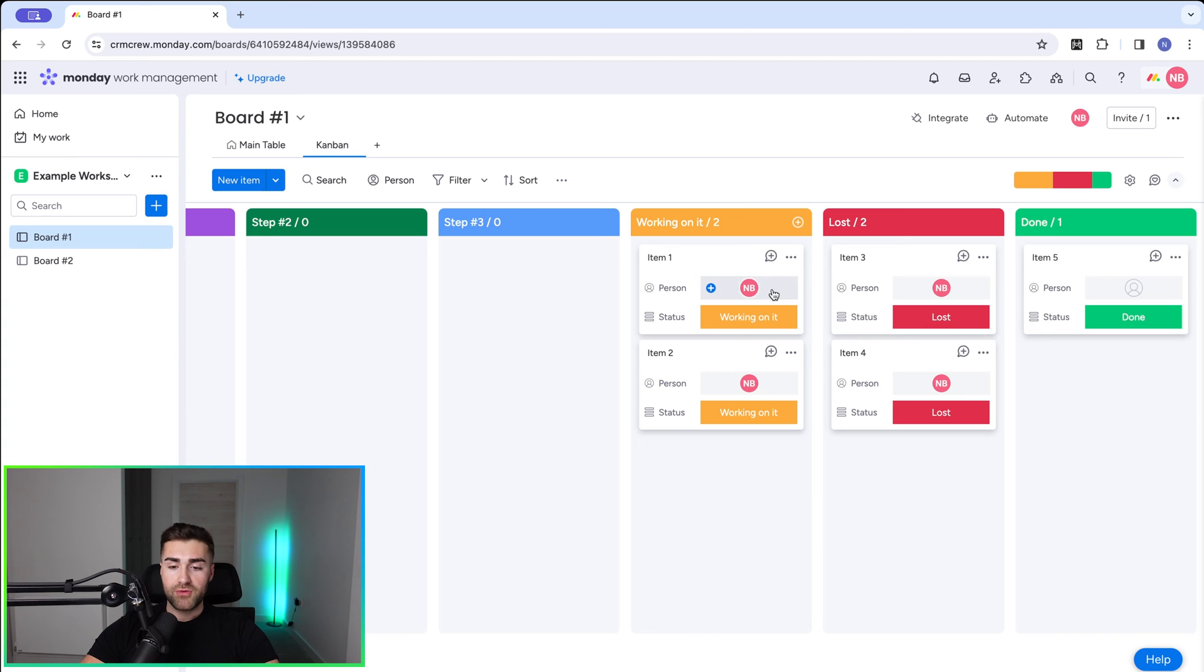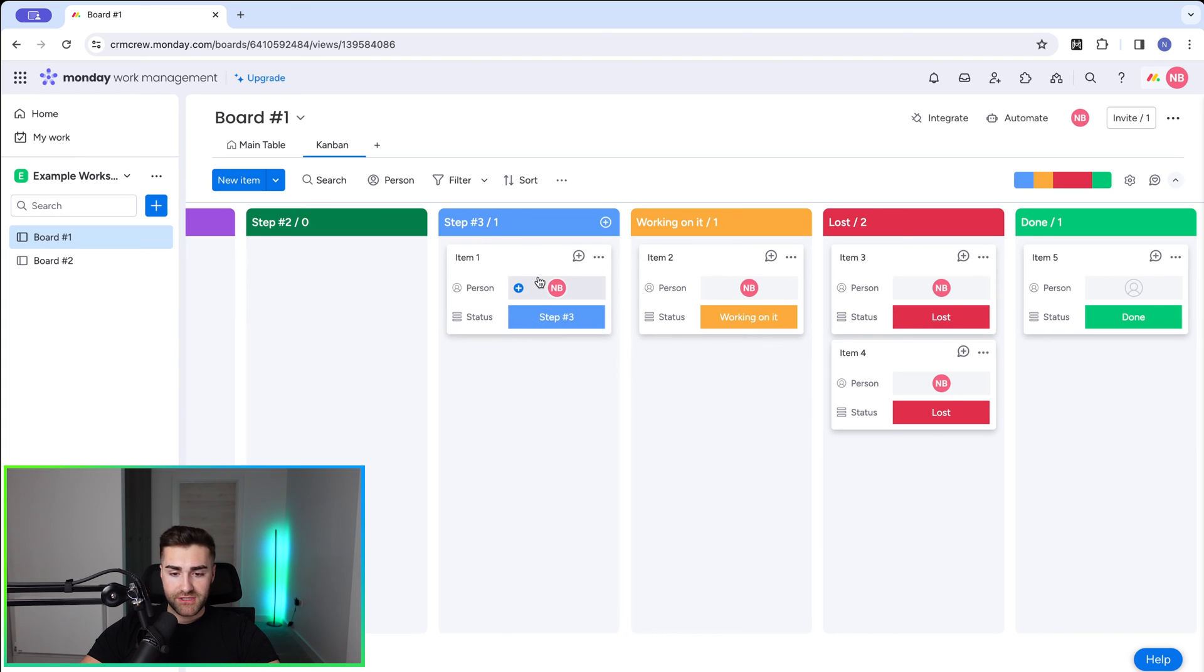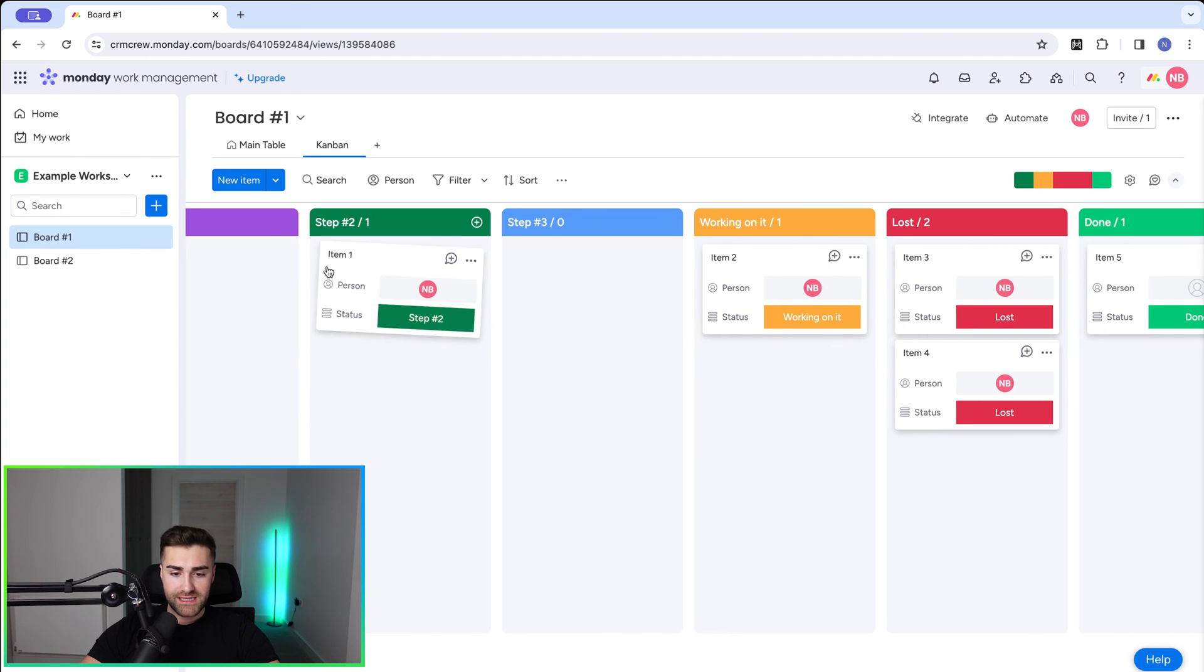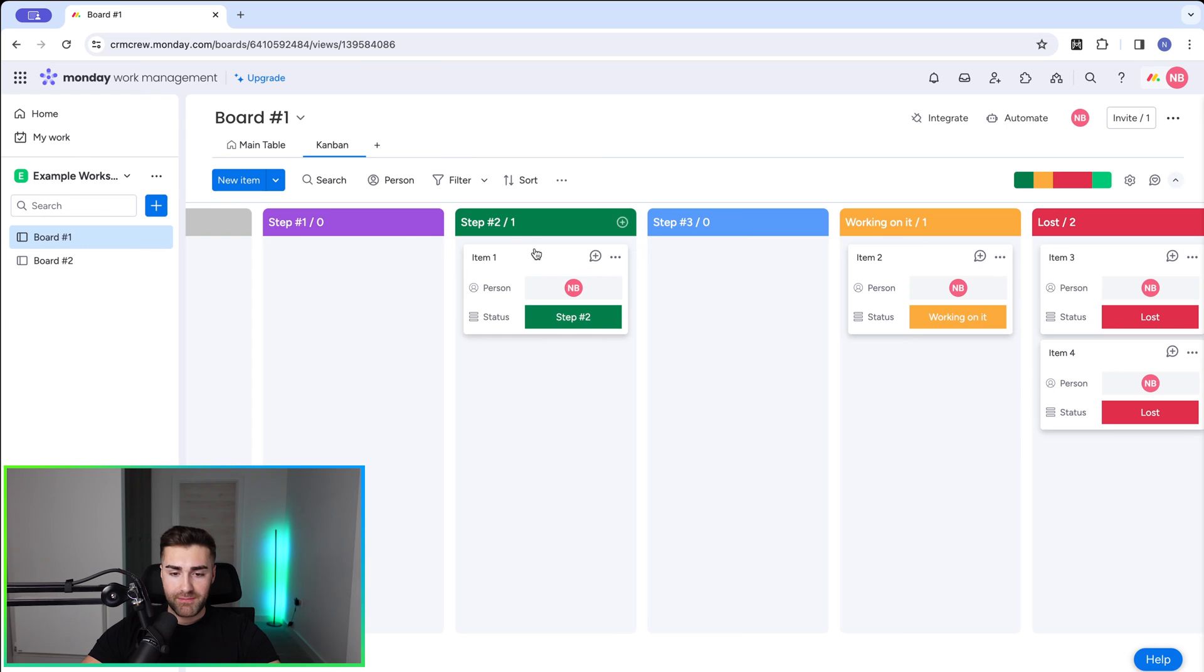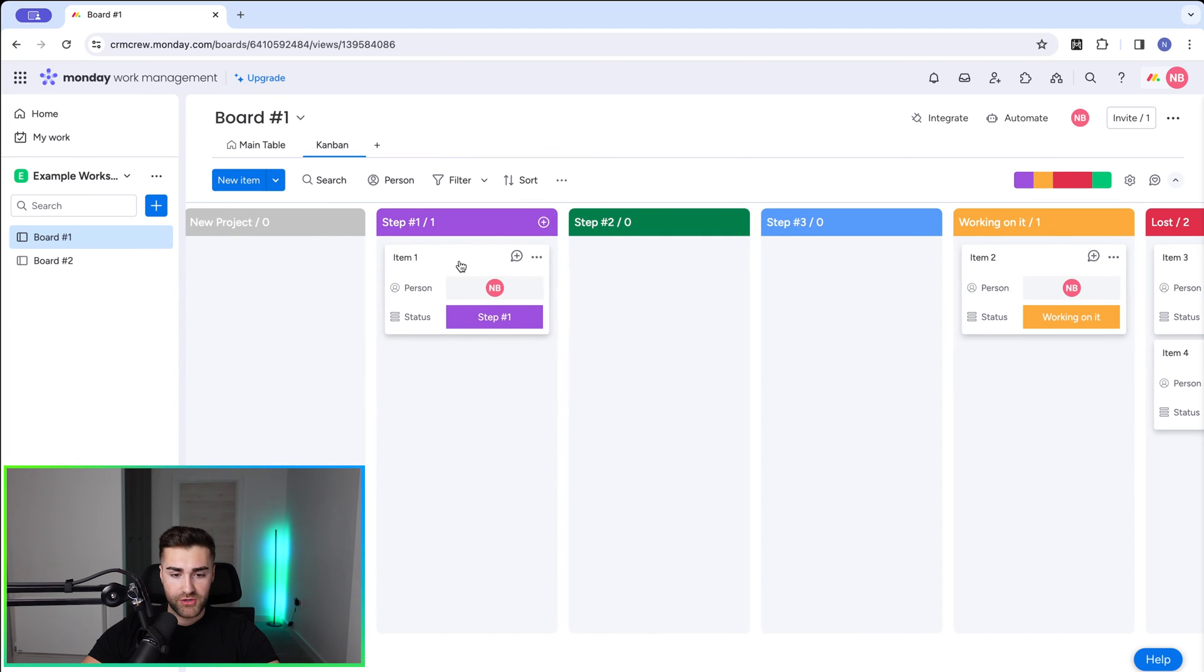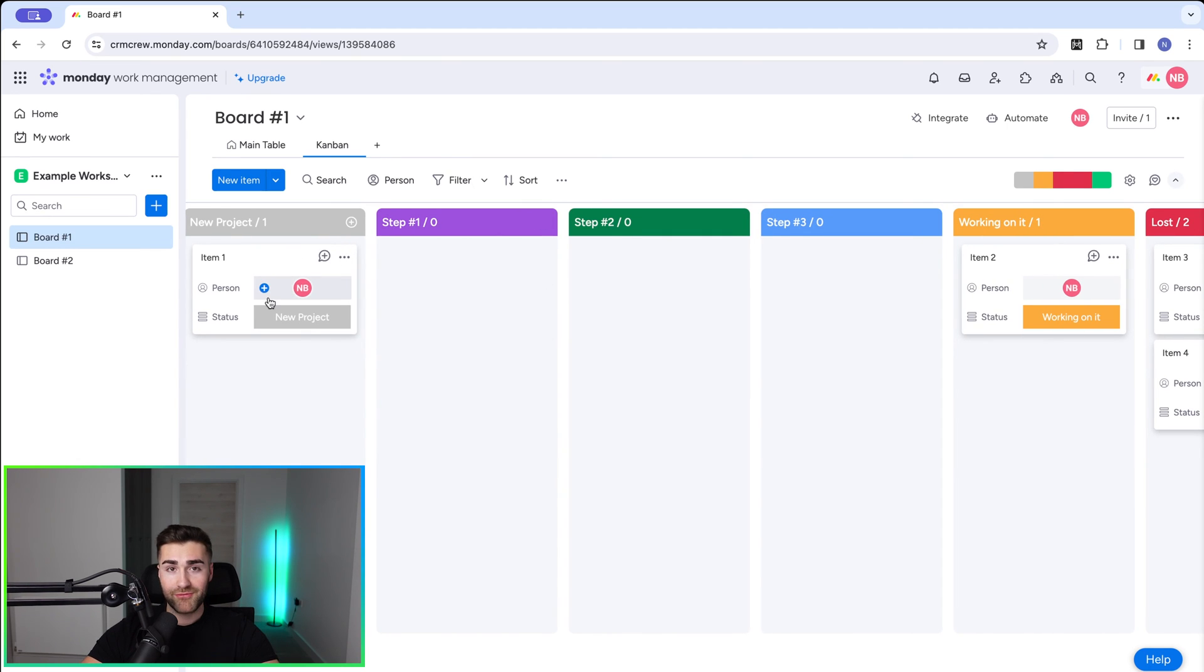One final thing to note is you can drag items from step to step very easily. You don't have to go back to the main table to update the status column. You can move them across the Kanban view very easily. It will automatically update the status column.